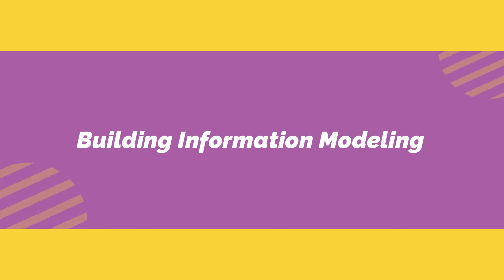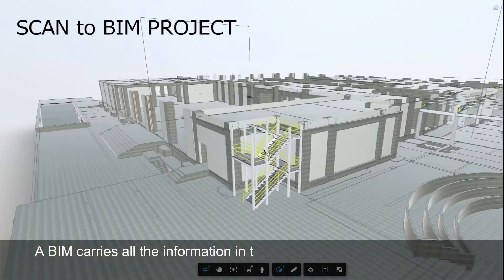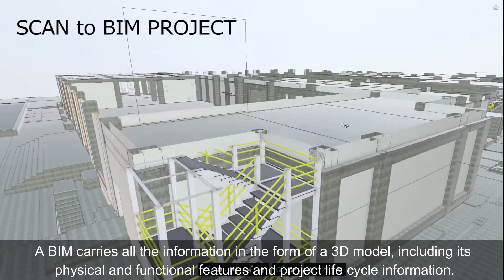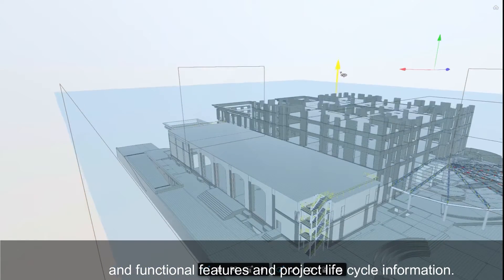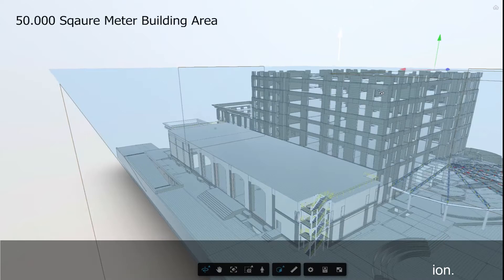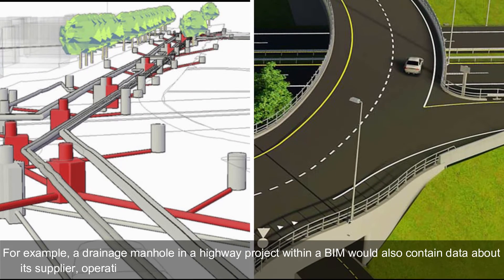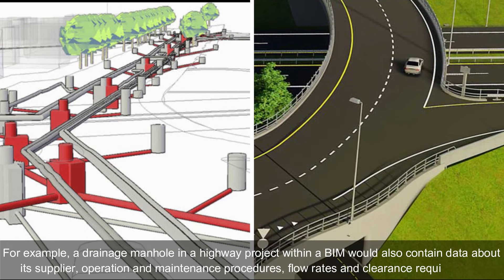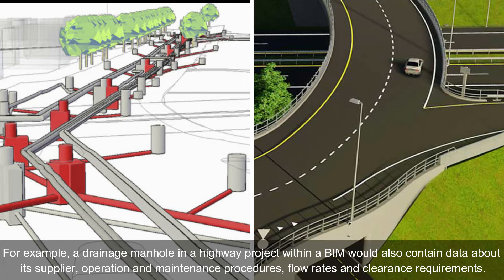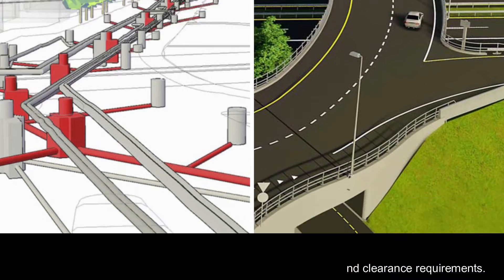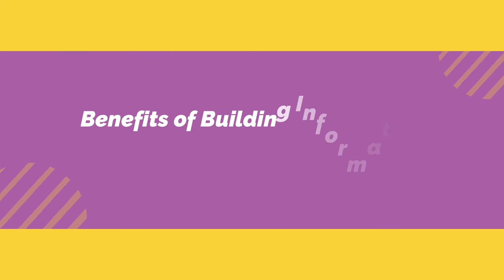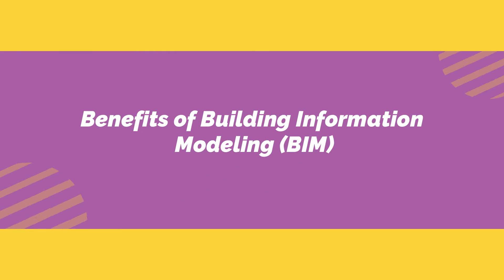A BIM carries all the information in the form of a 3D model, including its physical and functional features and project life cycle information. For example, a drainage manhole in a highway project within a BIM would also contain data about its supplier, operation and maintenance procedures, flow rates, and clearance requirements.